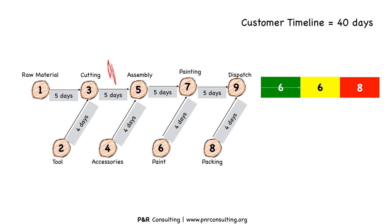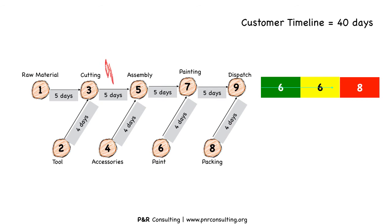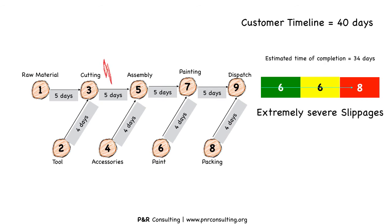What if the penetration is in yellow? It indicates that the project is still under control, however it may get off track at any moment. Here the estimated time of completion becomes 28 days — we could sense a slight delay. What if it is in red? Penetration in red indicates a possibility of delay, and at this point the issue has to be escalated to top management. Notice that the estimated time of completion here is 34 days. Any more slippage will take us close to the project deadline and hence cause a delay.